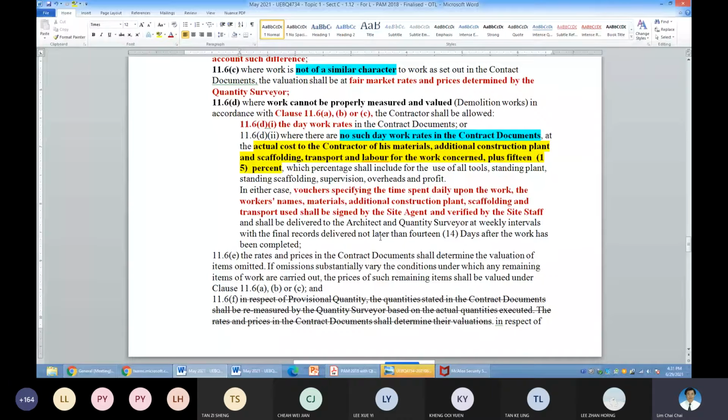So it's important. That's why time is given here. That is to avoid confusion, because if you are not clear, then immediately you can ask for clarification, and not one month later. Your request is going to be rejected. So you have 14 days.